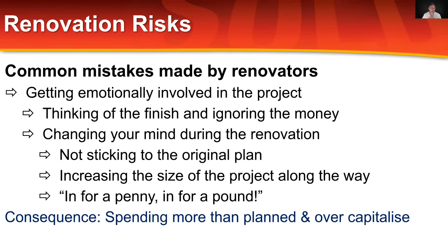One of the most significant problems that one of the members I was mentoring at the time faced was they changed their mind from a cosmetic to a structural reno halfway through. And it cost them a lot because they became emotionally engaged in the image of the perfect finish as against what the market there was wanting, what the people there were looking to buy, and what the people in that suburb valued. And that disconnect, the idea that because I like it, everybody else will.